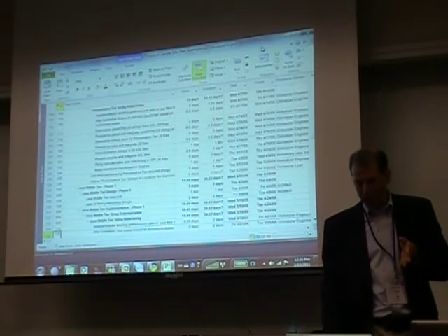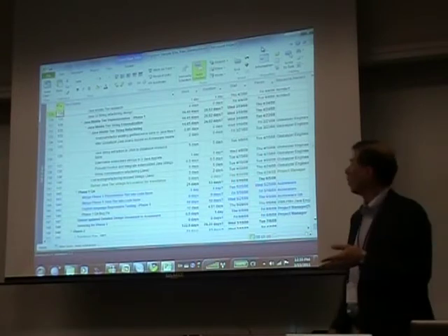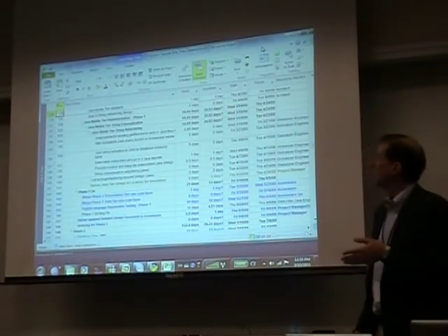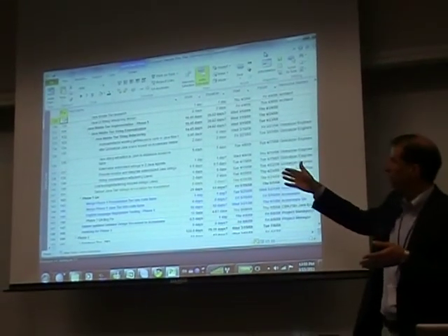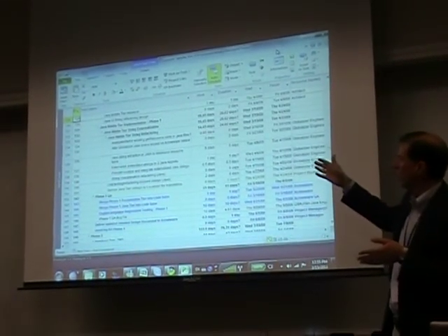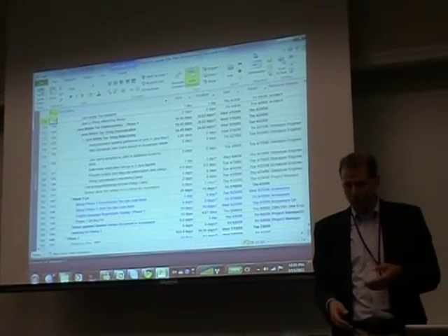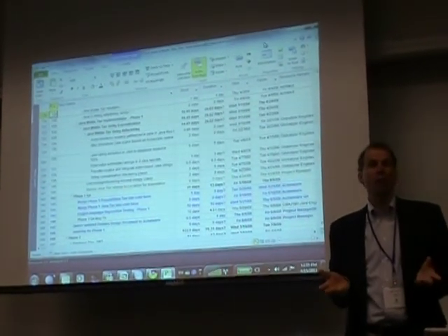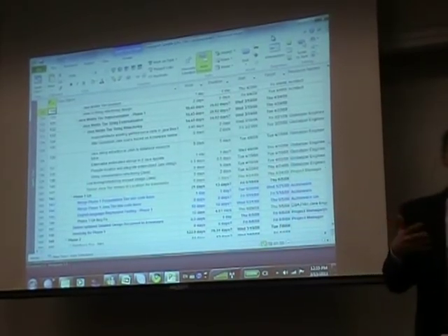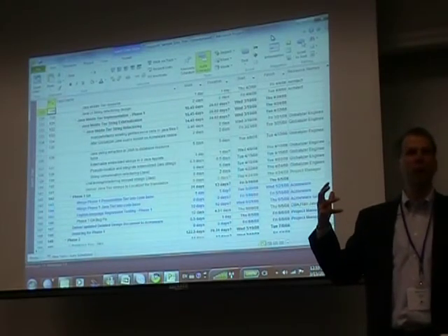Now we have a middle tier here. You can see line 131, we have the middle tier that we're going through. Again, it's the same set of functions. We're going ahead, we're string refactoring, and then we're looking at locale sensitive methods and programming patterns. If you look at line 138, we're pseudo-localizing so that we're building some test of what we're doing right into our engineering. That's sort of our unit test before we go into the monolithic QA phase.